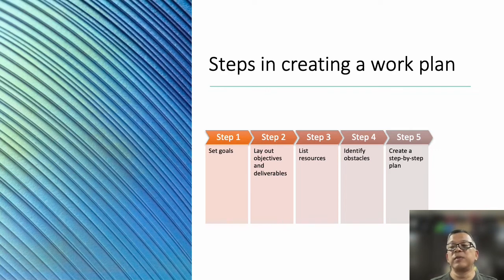Step 5. Project completion will not materialize by magic. You will need to build a timeline to show the steps in achieving the goal. For each step, you need to identify an owner and a target date. Without an owner and target date, your project will become a moving target, like a sailboat. It will just go with the wind. It doesn't have a specific direction. It will never ever reach fruition or completion.